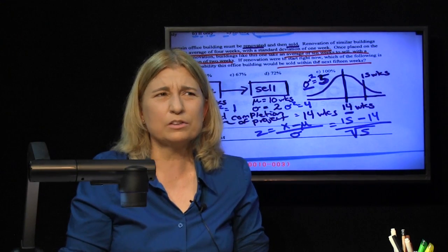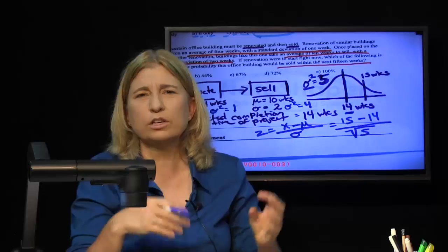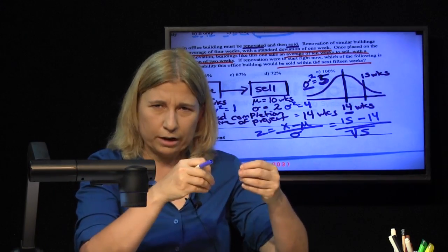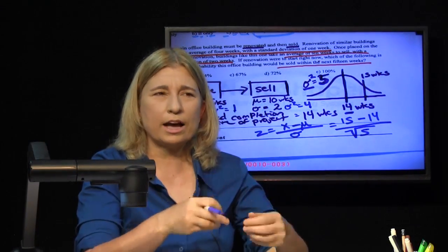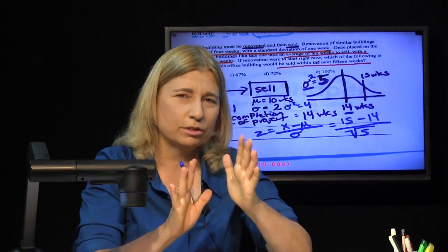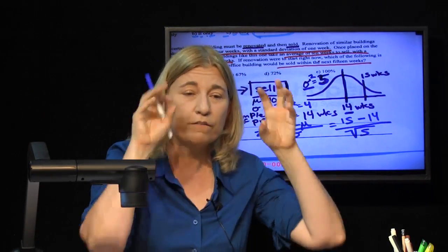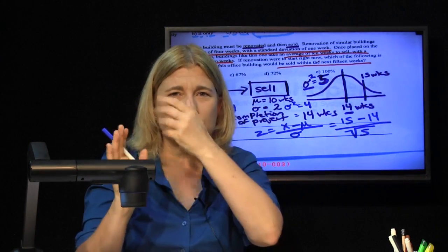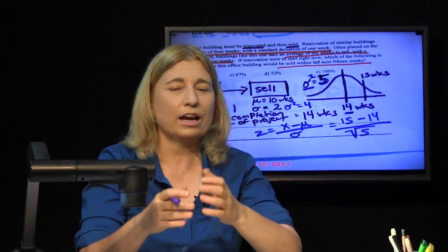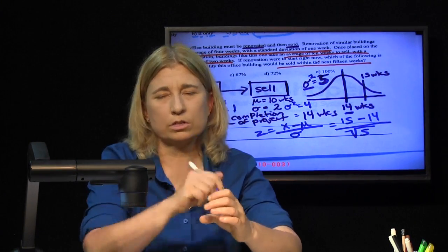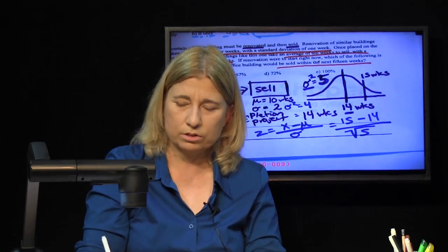You say, why are you making this so complicated? I had 2 little standard deviations and now I need a big one. Their combined effect, right? Why don't I just add them? You cannot add standard deviations. You can only add variances. Just find the variances, add them together. That's then not exactly what I need for the big z-score. Take the square root of that and put it in the z-score.